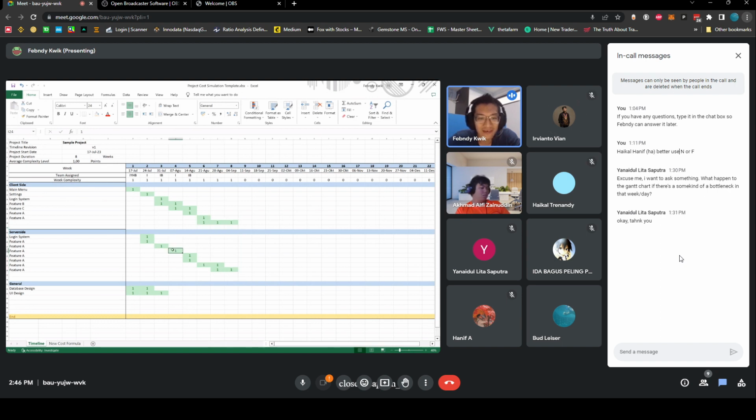But let's say we have a delay here. So this is delayed, meaning what will be affected is this, right? You find the first cutoff that you can find. Let's say I can change that because this is conditional formatting. But let's say this is delayed. Now, since this is delayed, your team that's supposed to be working here, most of the time they have to wait for this. You're going to have to find a split like this. So this is a whole new module, and then you can switch that like this.